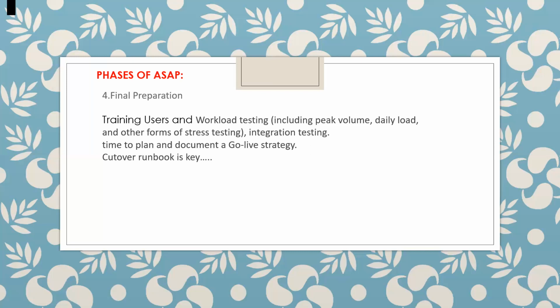You will also do integration testing. You have checked your module, it is working fine. The FI person checks his module, it is working fine. Another person checked his module, it is working. When you put them together, wherever integrations are there, you might have chances of failure, or your application might be slow. All these things will be there in your final preparation.